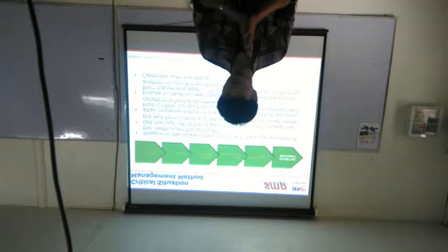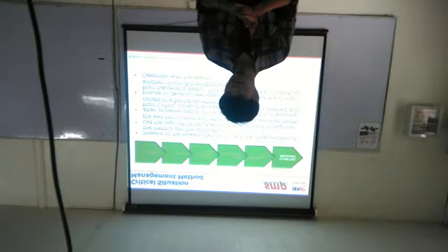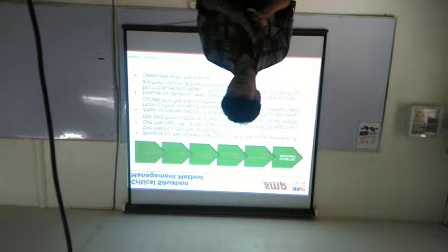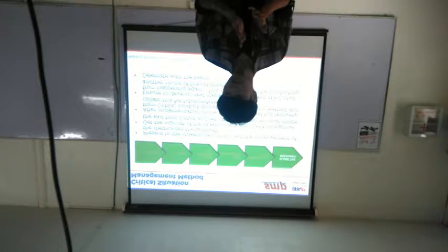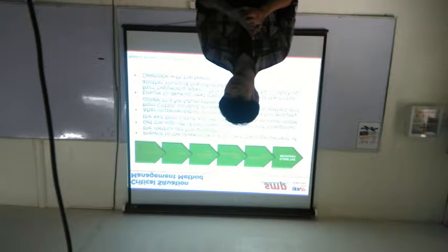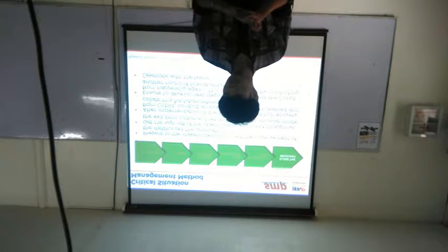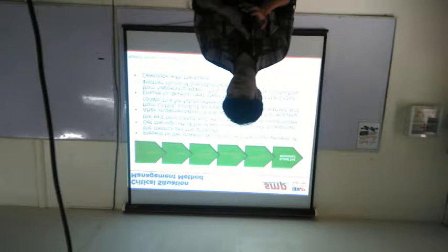Next is close the recovery. Present to the stakeholders and client the improvement of the metrics per the glide path. Get the sign-off of the stakeholders and client to approve the exit from the CRITSIT and return to business as usual mode. After implementation of the action plans and full recovery from CRITSIT, conduct an evaluation of lessons learned and collect this for future references. Ensure to develop next steps that will prevent the CRITSIT from happening again. This could be done by conducting another round of brainstorming sessions. And lastly is celebrate with the team.